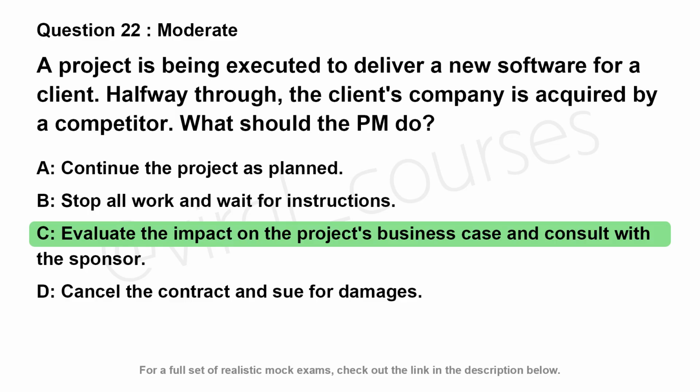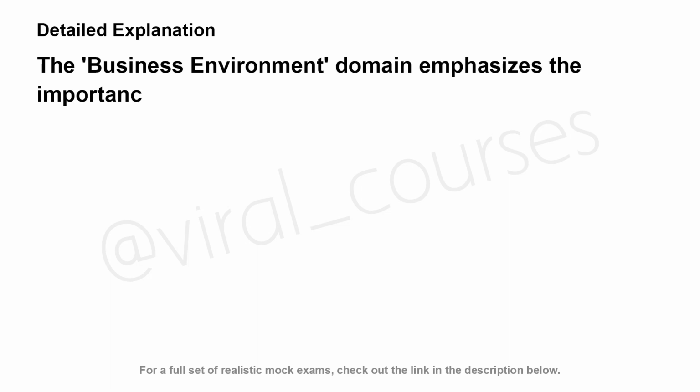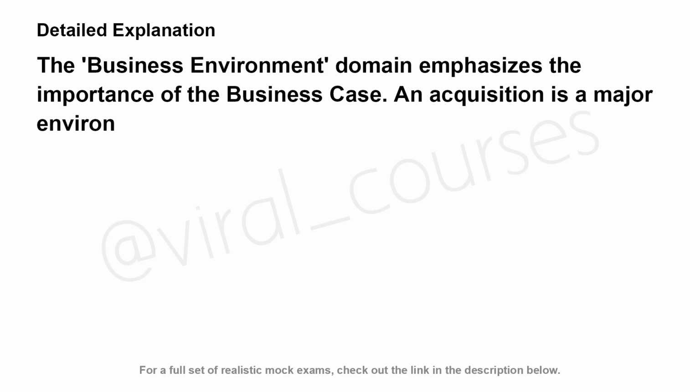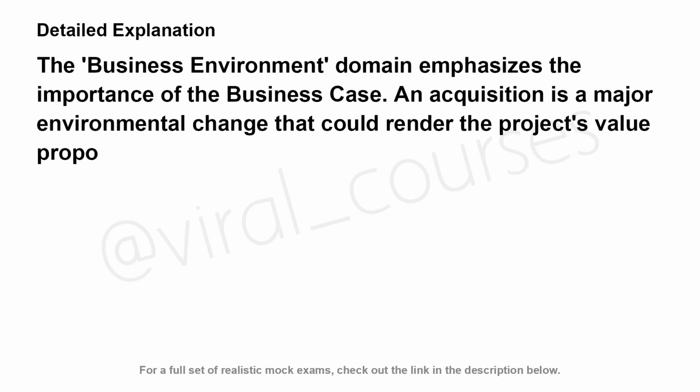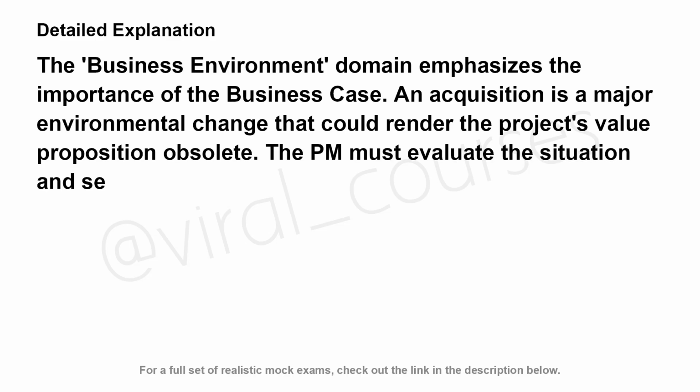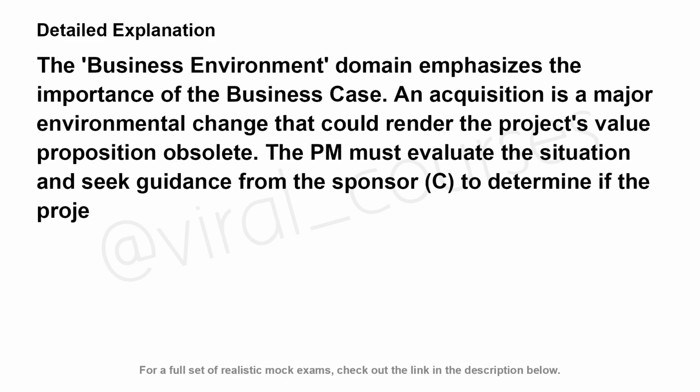The correct answer is C. The business environment domain emphasizes the importance of the business case. An acquisition is a major environmental change that could render the project's value proposition obsolete. The PM must evaluate the situation and seek guidance from the sponsor. C. To determine if the project still provides value.